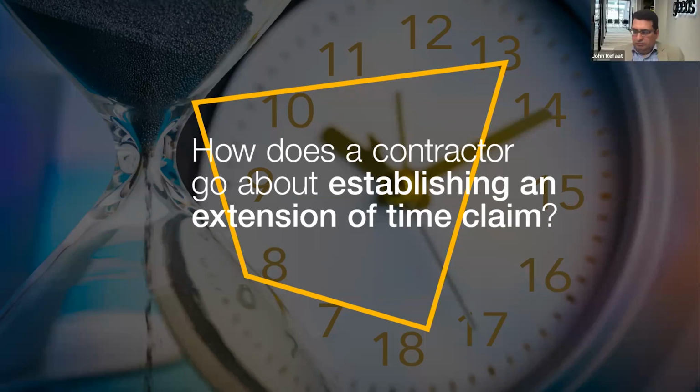Yeah, Chris. I would say that it is important to read and understand the contract and know the terms that govern extension of time claims. These terms may require notices to be sent, as we said before, within a certain time frame. And if notices are not sent, you may lose your right to file a claim.